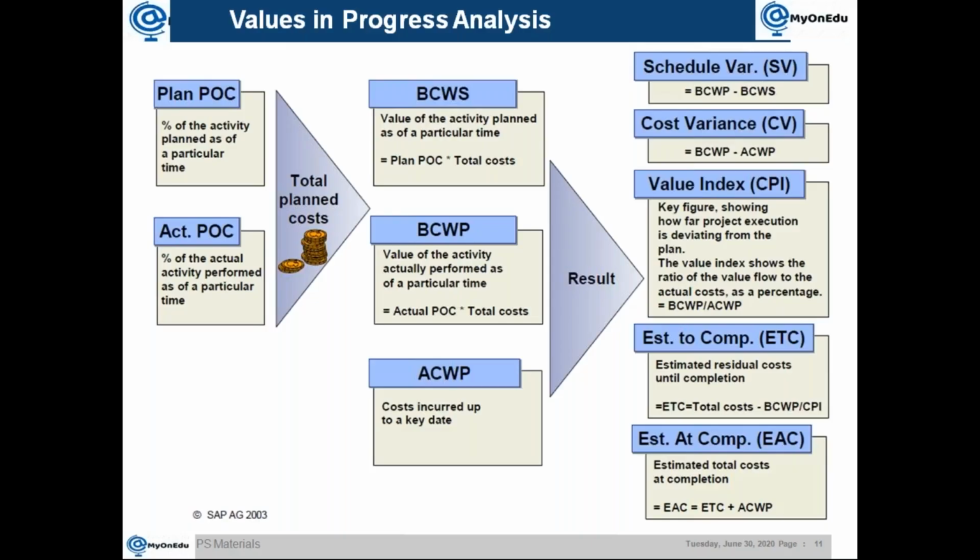Okay, so you might have seen the schedule performance index, SPI, in some of the KPI dashboards. If the SPI value is 1, then the health is good. If it is less than 1, it means it is going to be delayed. If it is more than 1, it means it's going to finish early. Like that, there are different calculations available.